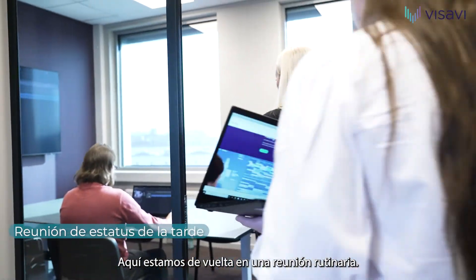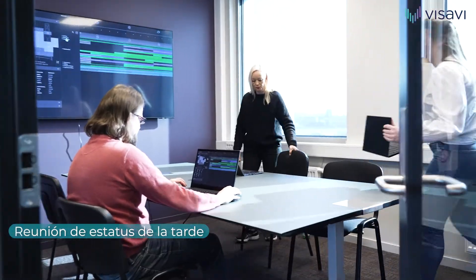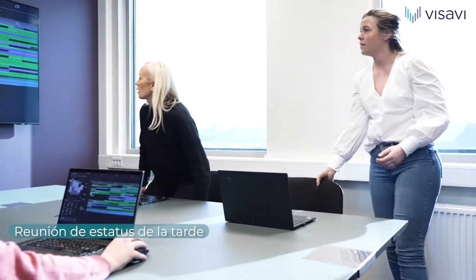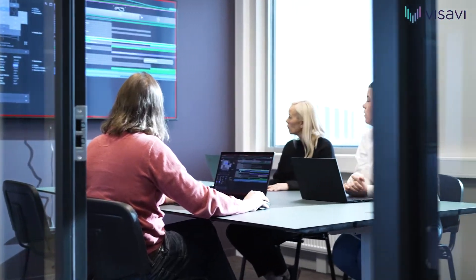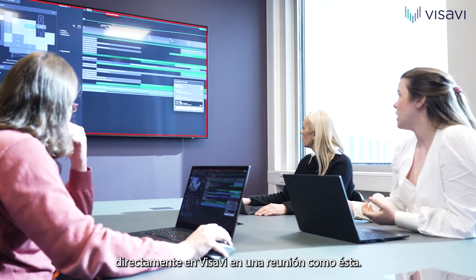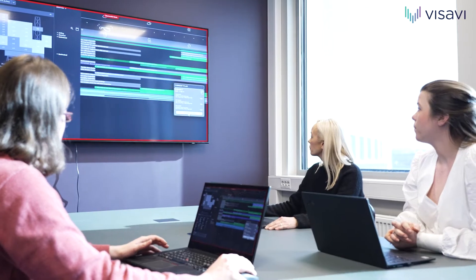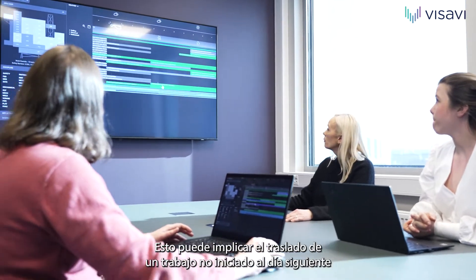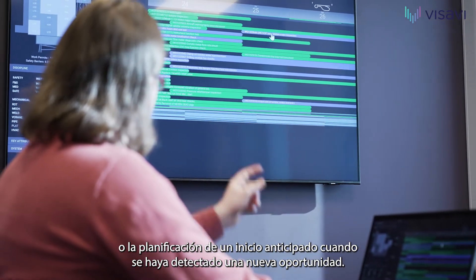Here we are back in a routine meeting. This is a daily status review towards the end of the work day. The team will review the progress made during the day, noting any activities that are delayed or ahead of schedule. You can also update job status directly in Vis-a-Vis in a meeting like this. The schedule ahead is now adjusted according to actual status. This could be moving an unstarted job to the next day, or scheduling an earlier start where a new opportunity has been spotted.